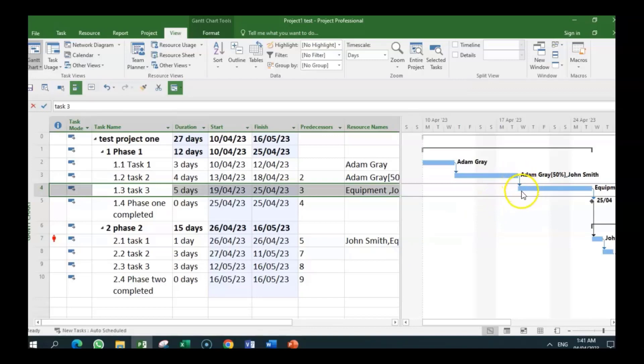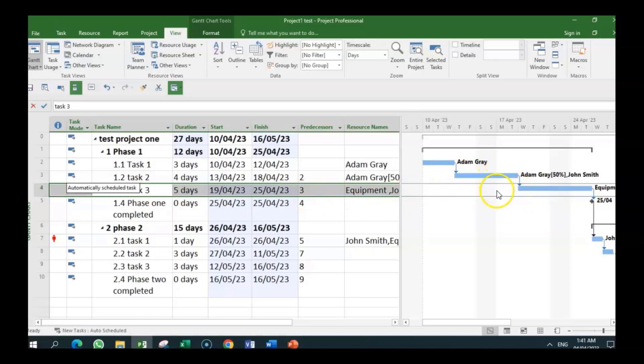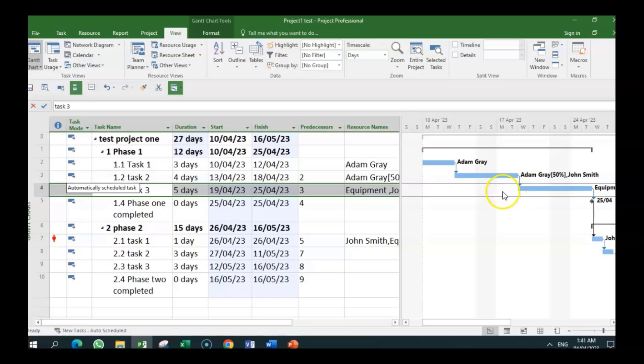It has gone from starting before to starting after. So by just changing the lag and removing it, we have resolved this and this is no longer over-allocated. Again, if we really want it to be—if this is on the critical path and we don't want to extend it, we can look at overtime where we can pay somebody or allocate somebody from the non-critical activities.